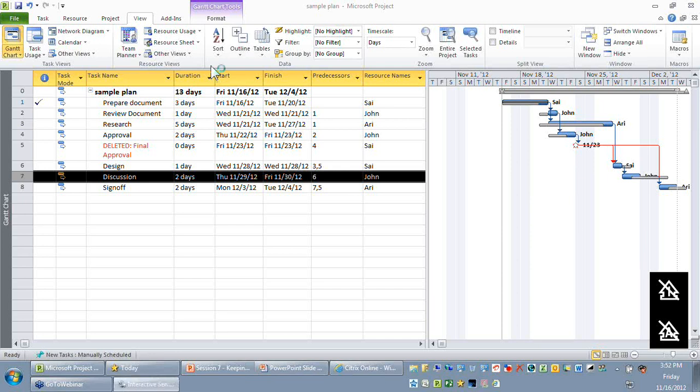See, if the activity has already started, you cannot baseline those selected activities. So I would recommend that you add a new activity to your project plan, select those new activities and do the baselining. If the activity has already started, very true, you cannot select that activity as a part of your baselining. But when an activity that has already started has its remaining effort revised, I recommend that you put it as a separate task so that you can select that task and do the baselining.